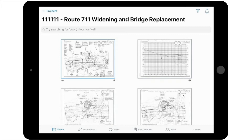A photo stamp is an icon used to indicate that there are photos available on that section of the sheet. If prompted, select Allow to permit PlanGrid to access your location while using the app. Note that all pictures taken in PlanGrid record the latitude and longitude of the spot where the picture was taken, as well as the time and date.